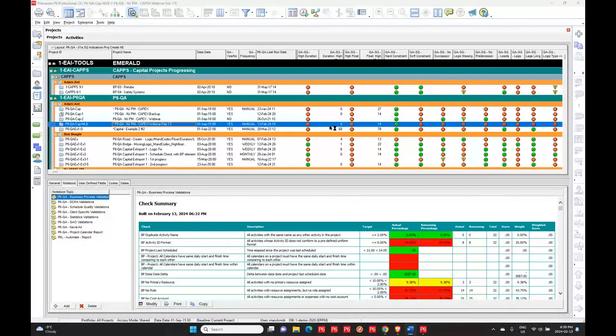Now, I realize people can code things wrong. That wasn't the situation here. Those mandatory codes were not populated. So what they ended up with was a management report that had numbers missing. Like, basically, there's no other way of putting it, it is numbers missing. That's not a fun time either. Again, that's another check P6-QA will look after for you.